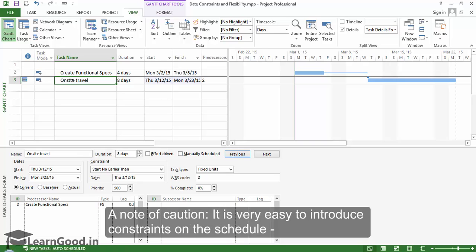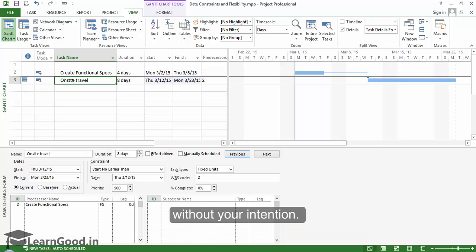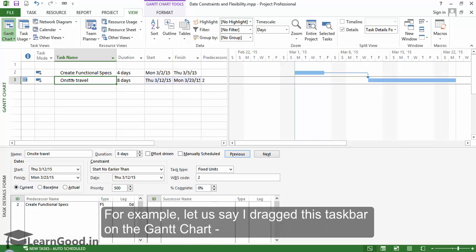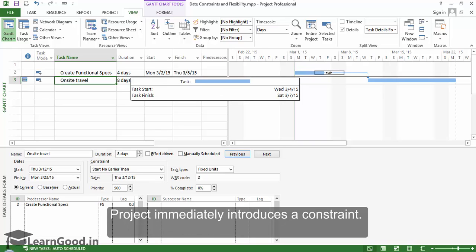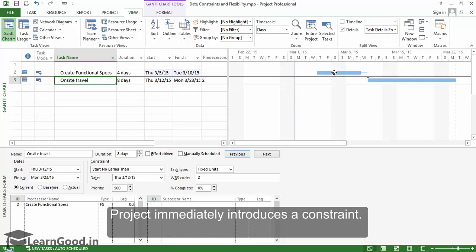A note of caution: it is very easy to introduce constraints on the schedule without your intention. For example, let us say I drag this taskbar on the Gantt chart. Project immediately introduces a constraint.